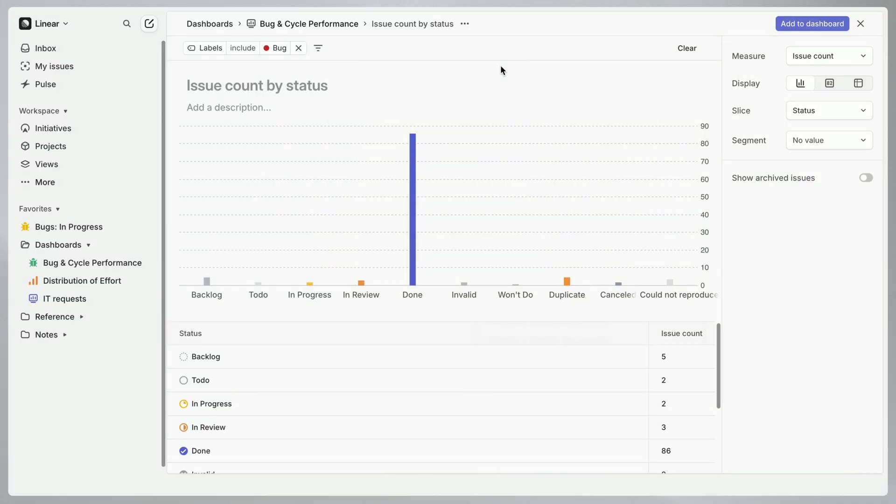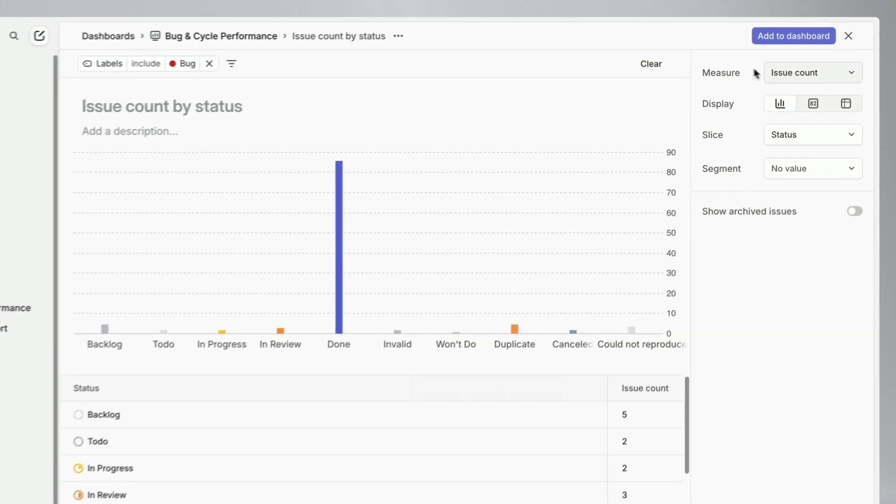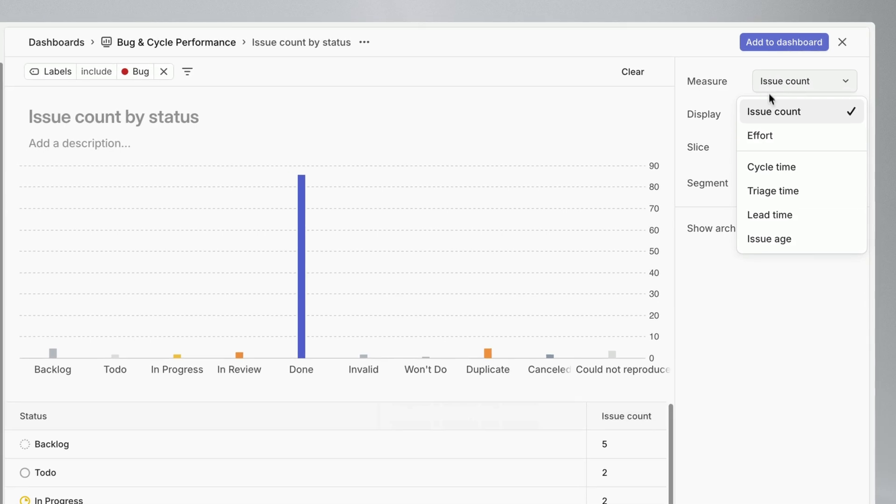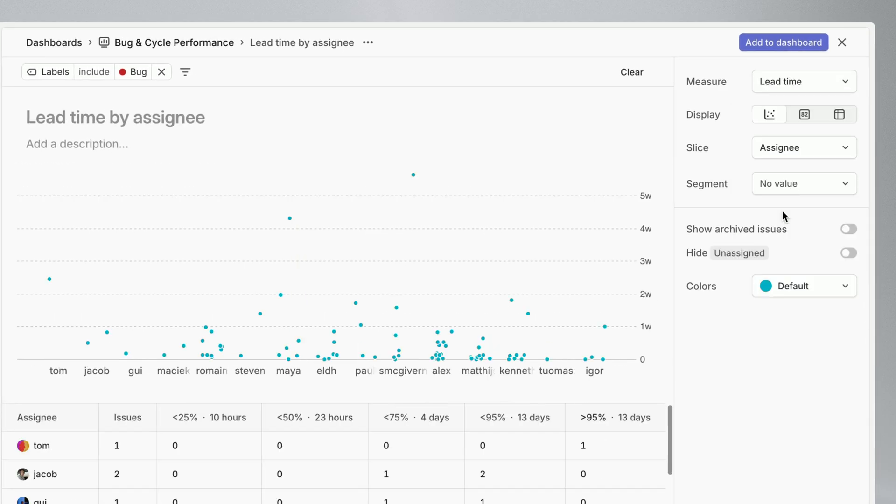Another metric we may want to monitor at this top level is our bug resolution time. I'll create an insight for that next. In this case I'll be measuring lead time, which is the time from issue creation to completion.